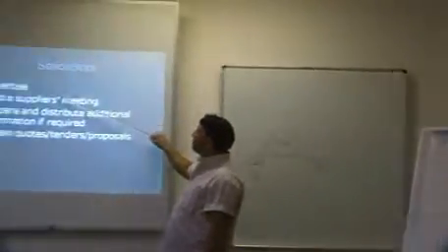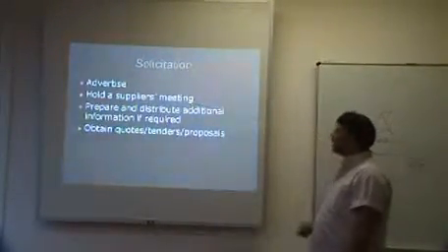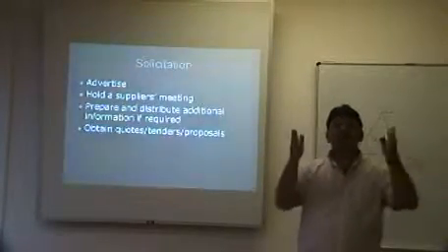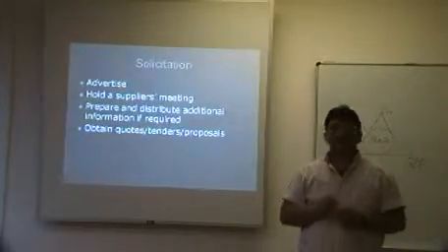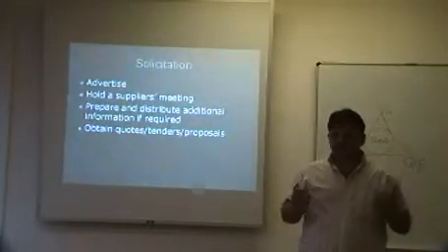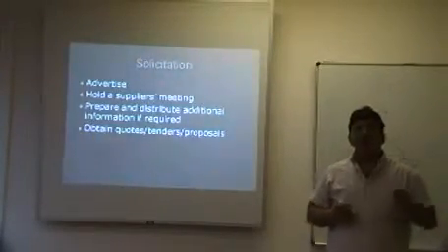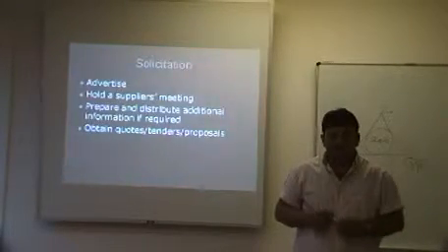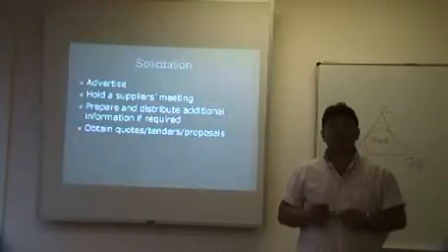Solicitation. When you solicit, you advertise, you hold a suppliers meeting. If we say a suppliers meeting, we mean once you've advertised in the newspapers, people will respond to the advert, and then you will have a Q&A session. It's called a question and answer session, where people will come and ask questions based on the advertisement or based on the RFP that you've issued, etc.